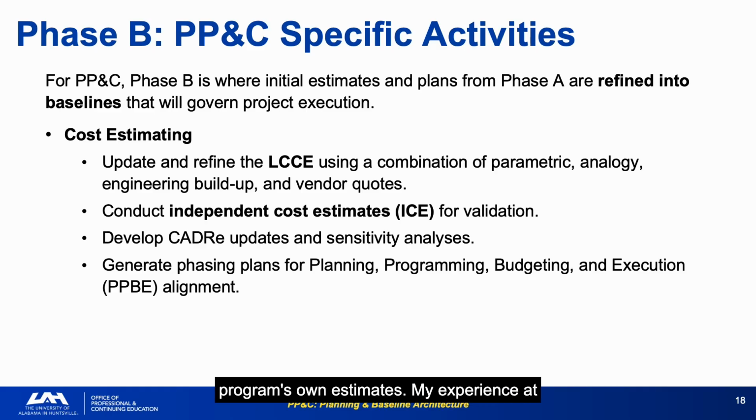My experience at both JPL and Lockheed is that programs consistently underestimate the need for integration and testing. CADRe updates in Phase B should reflect what you've learned from preliminary design. If the cost grew, document why. If it came in under, explain that too. The review board expects the evolution to make sense.